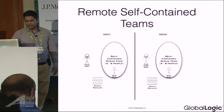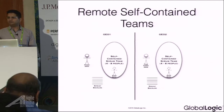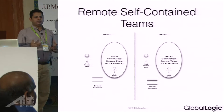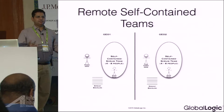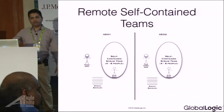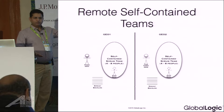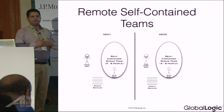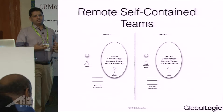The remote team will be missing context from the on-site. This is the pattern I generally like — and which was mentioned by someone here — if you can have feature teams that can work independently, why at all do you need the distribution? Many times people create distributed teams just for the sake of it: because we have certain people in the US and certain people in India, let's have a distributed way of working. Many times that is not really required. You have people over there doing feature development over there, and we can have our own feature team developing features here, touching base only on integration points.